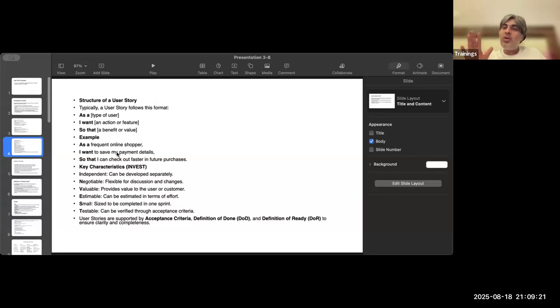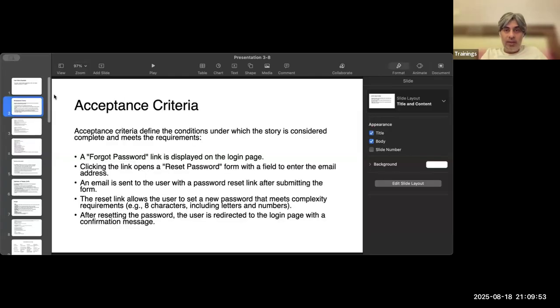And those user stories will be written by product owners. They will introduce the story to the team and then have a discussion. But primarily, they are responsible for writing these in Jira. And it will always be in this structure: from the point of view of a user, some action, and what is the advantage of that action to the customer. So now let us take an example.